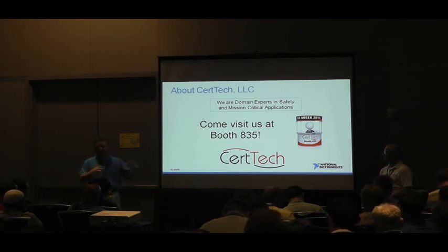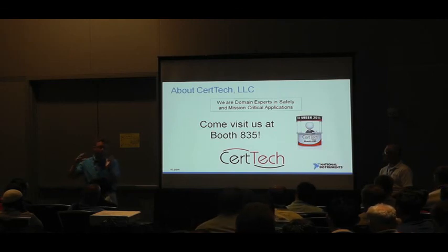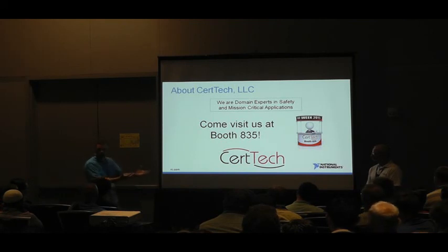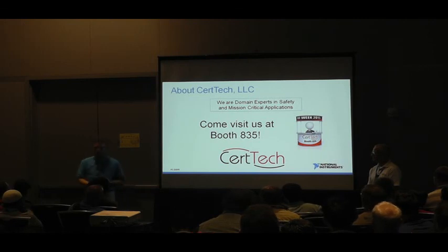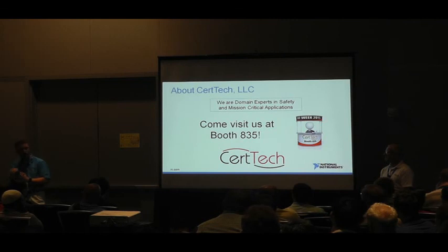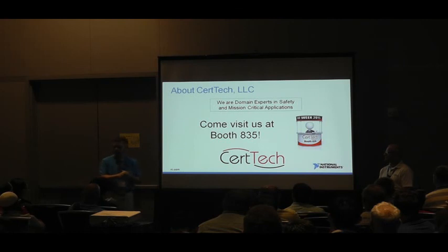So, you know, typically when Paul and I work together, I'll list out all the tasks that need to be done from a technical perspective. These are the software modules that need to be created. These are, you know, what I think needs to be done. This is the estimate. Then I pass that on to Paul. He does the quote. Now, when we go to implement that code, maybe we didn't provide that to the customer. We just gave them a big, hey, this is what it's going to take. But now, internally, we can go through and say, okay, this is what I need to do. I do need to follow this work breakdown structure. I do need to track to the task. So, good question.